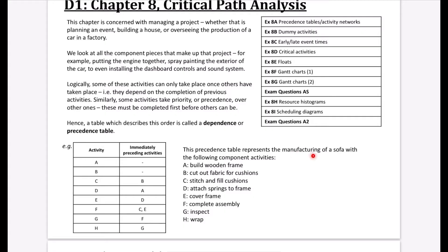This precedence table represents the manufacturing of a sofa. Activity E has D as its immediately preceding activity — to cover the frame, the springs must have been attached first. So it goes: build the wooden frame (A), attach the springs to the frame (D), then cover the frame (E). Activity C depends on B, and activity F depends on both C and E — completing the assembly requires the cushions to be filled and the frame to be covered.